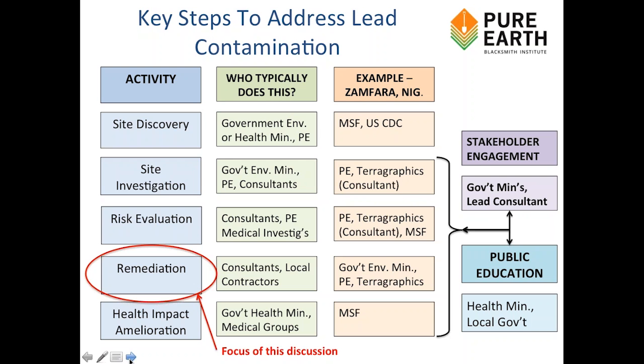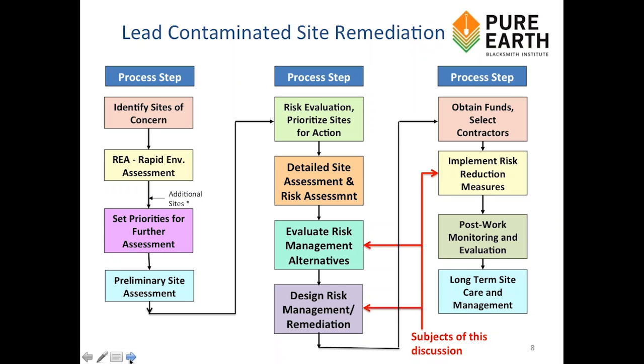Within the remediation portion of the work, there's a variety of steps: detailed site assessment, evaluation of alternatives, design of the actual remediations, funding, implementation, post-work monitoring and evaluation, and long-term site care. I'm going to focus on the management alternatives and the design of those remediation activities in this discussion, as opposed to looking at how you would do a detailed site assessment or talking about post-work monitoring and long-term care.